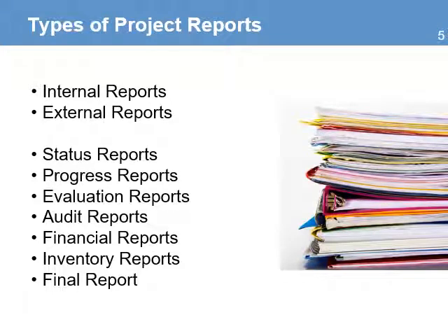There are two types of project reports during this phase: internal reports to management, to supervisors, steering committee, and external reports to the donor and other key external stakeholders. The reports include the following: the status reports, information on the progress of activities owned by the team. These are usually on a weekly basis during the team meetings.